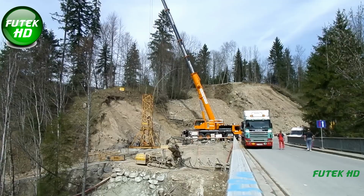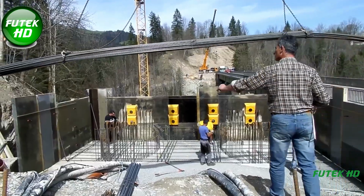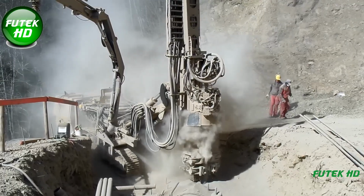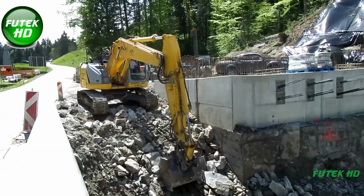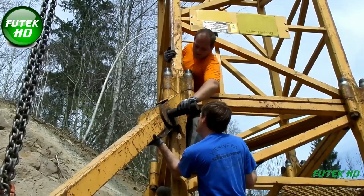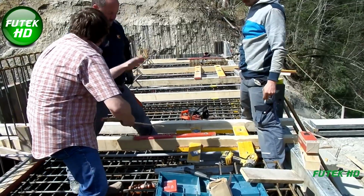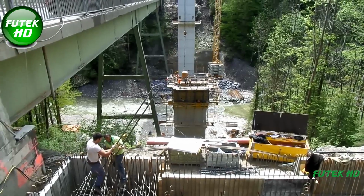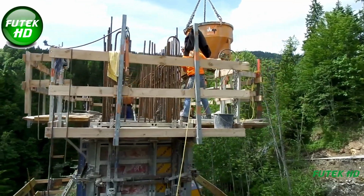The construction of the bridge began in September 2013, starting with the foundational work for the two main bridge piers. These new piers were strategically positioned outside the riverbed on the steep slopes on either side of the Waisak, slightly upstream of the existing supports. To access these remote locations, a steep access road was constructed along the left bank of the river, while a secondary construction road was established on the right bank, ensuring that equipment and materials could be efficiently delivered to both sides. The foundation for each pier was anchored deep into the bedrock to avoid potential erosion from the Waisak's currents.